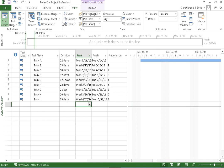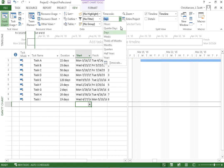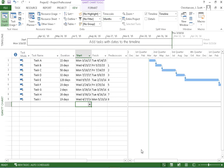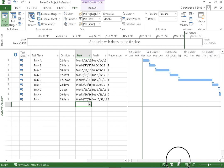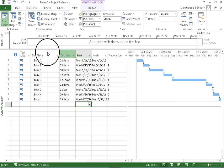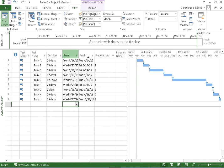I'm going to do this by going to the View menu, and you'll notice here it says Timescale Days. I'm going to change this to Months, and perhaps that will work a little bit better for me. That gets it almost all on one page, and I can make these columns a little bit less wide.